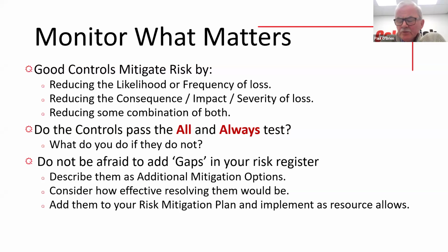I put the note in here, never be afraid to add gaps, because we call them generally mitigation options. There are additional mitigation options. And if you remember last time we spoke, we talked about the resources, because when you identify a gap, some people, when they're dealing with particularly compliance risk, they tend to want to hide the gaps.